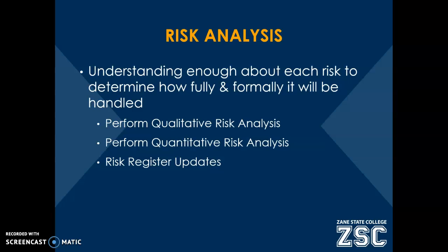So in order to deal with risks, we need to understand more about them and their likelihood of occurring, as well as the impact it will have on the project. There are different types of analyses that can be performed, qualitative and quantitative. And the results of these analyses need to go into our risk register. So the risk register is a living document that needs to be updated throughout the project.